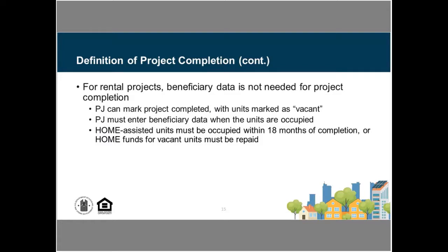But unlike our home buyer project or our homeowner rehab, where we have a known beneficiary, and in the case of home buyer, the title's actually transferred, for rental, we're going to mark that project as complete once the other factors have been met: the construction completion and the final draw of our home funds. And so the project would be marked within IDIS as being complete, and those units would show as vacant.